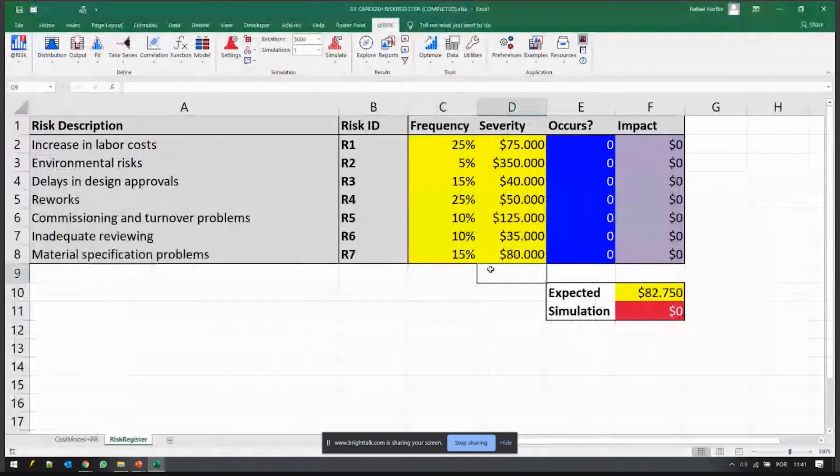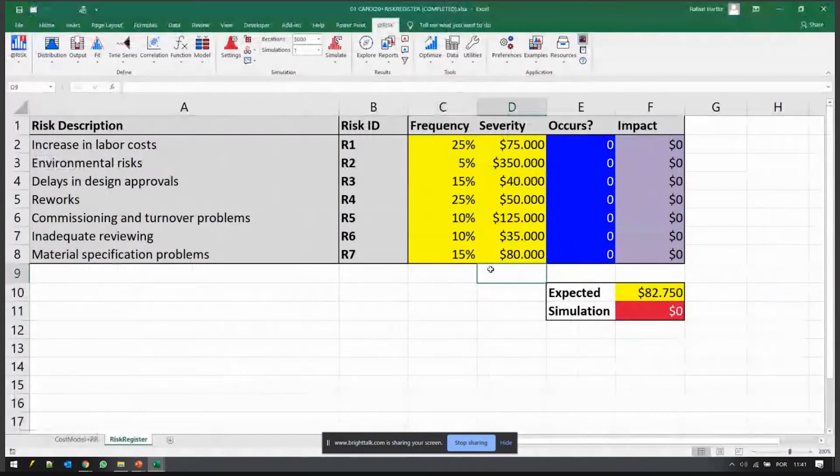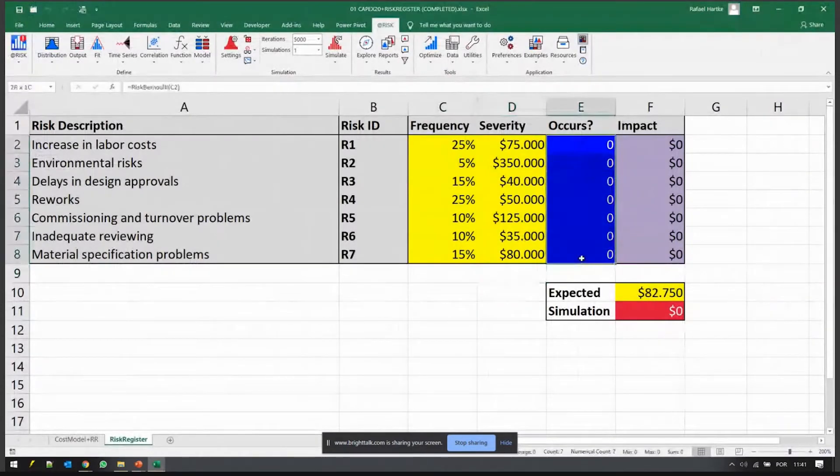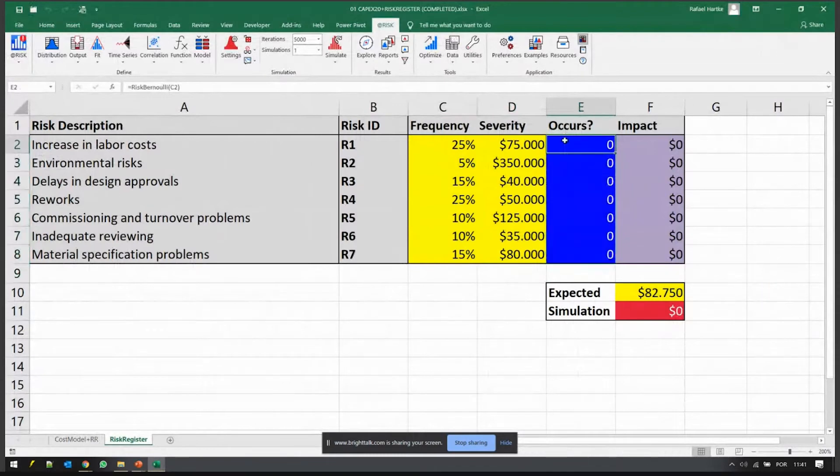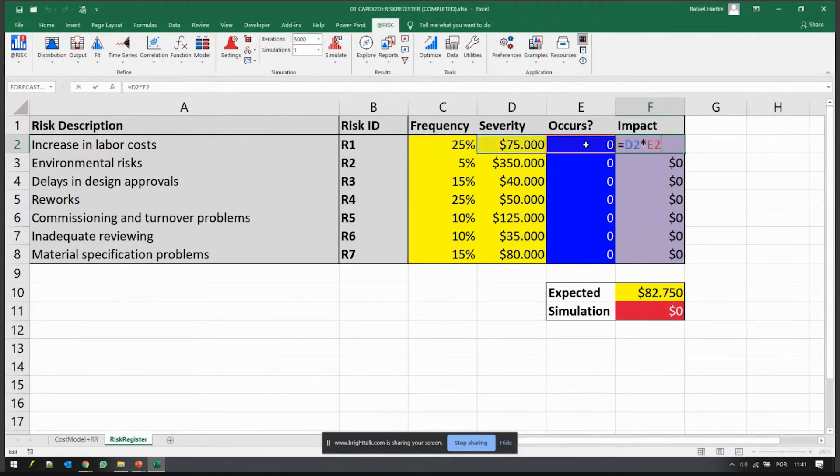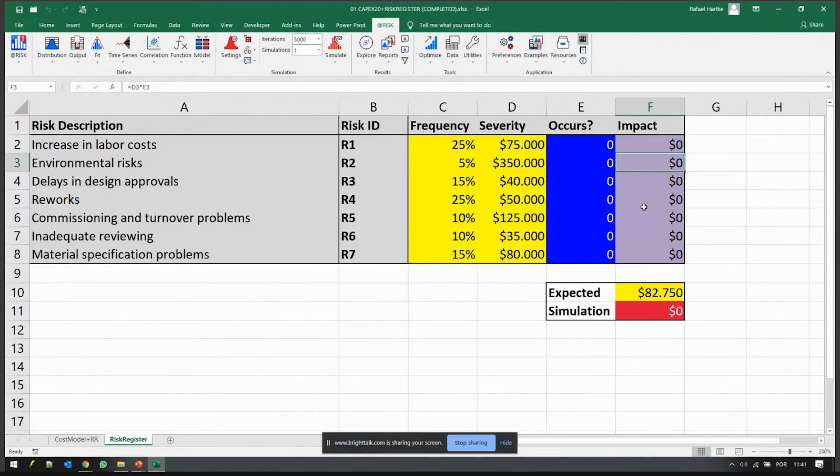That's how we're going to model events - it can either happen or not, it's a binary thing. When you do that, you are calculating whether the risks happen or not during the simulation, and then the impact can be calculated as a number around zero or one multiplied by your severity.